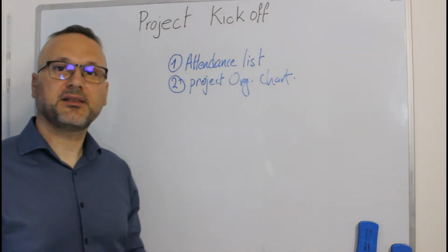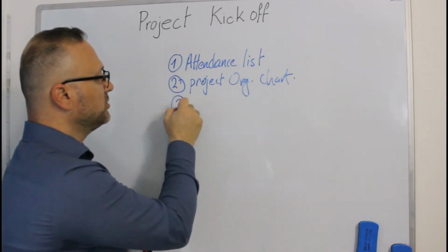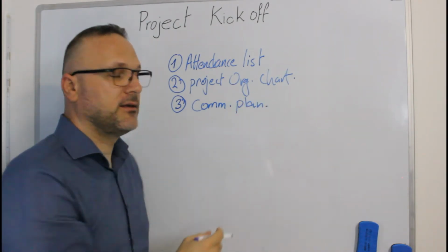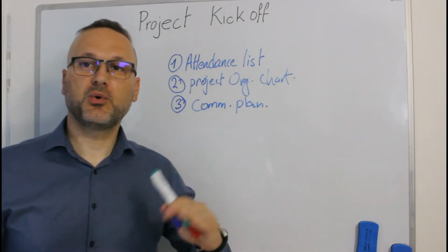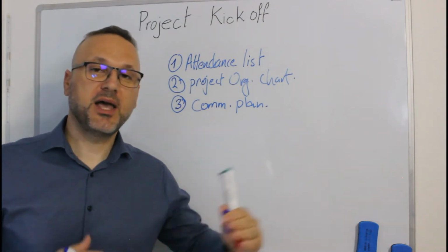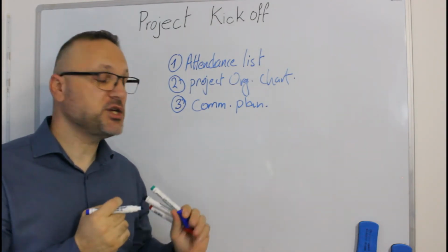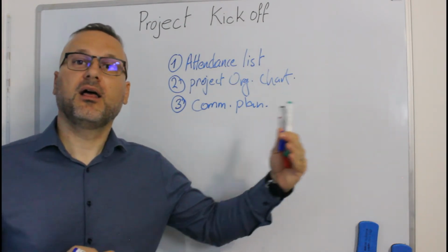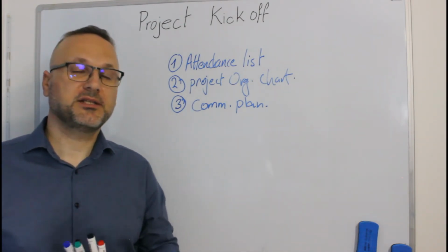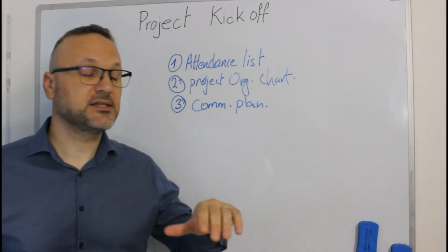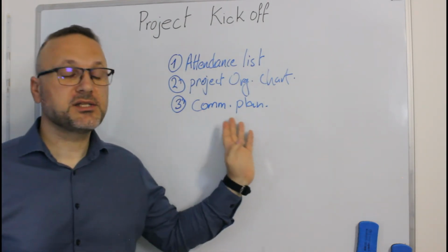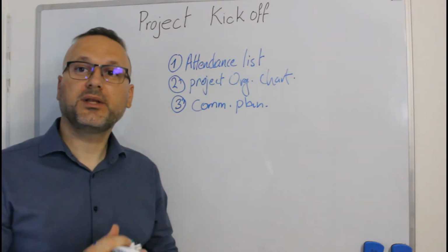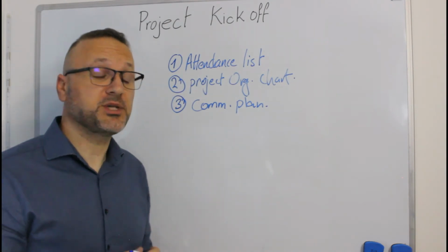After we explained the organizational chart, we will go to the communication plan. Who is reporting to whom, who is sending emails to whom, and during the communication, where the reporting has to be copied, how to be communicated by phone, by email, by faxes, by meetings, describe those meetings, and so on and so on. Now we need to summarize the project goals and objectives.